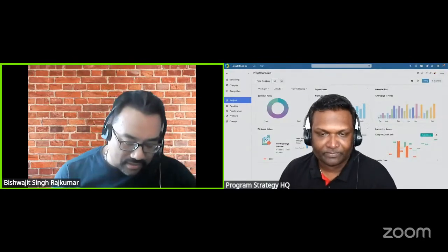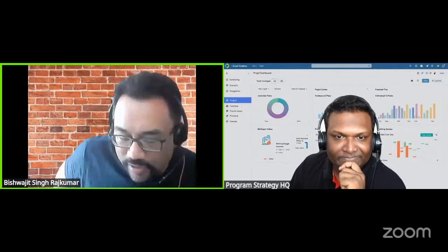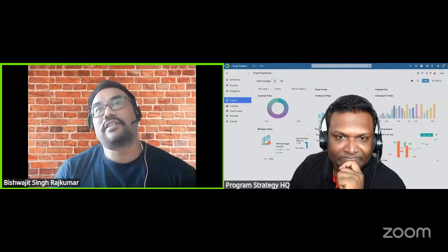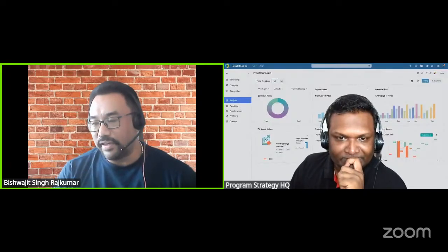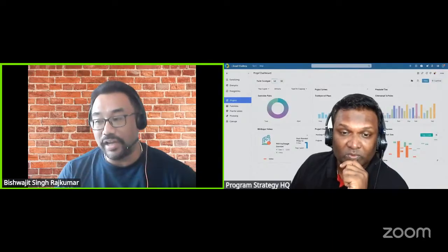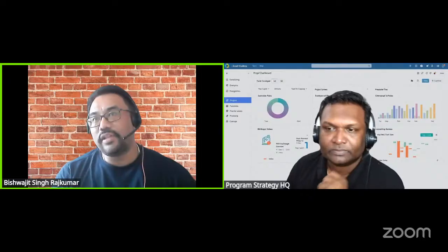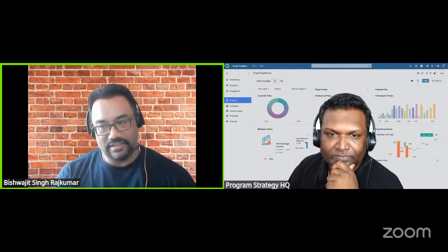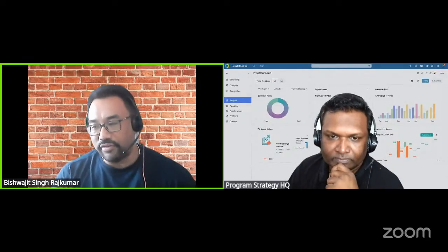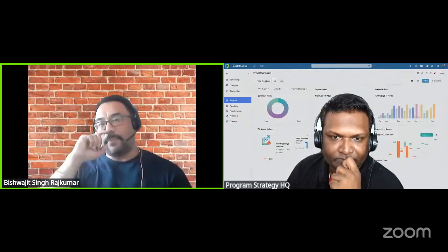When I bring up the topic of organization-level training, it's because we had a big slippage in our sprint deliverables. When we did the RCA, we found that the team was bombarded with mandatory trainings. Normally, I provide a 15% buffer from the entire team capacity.